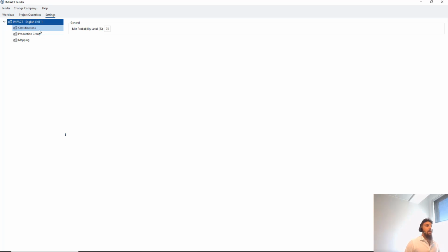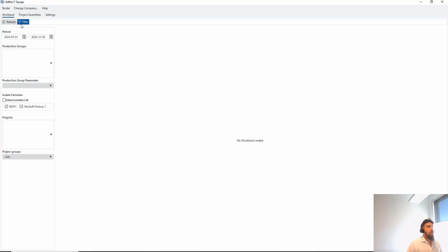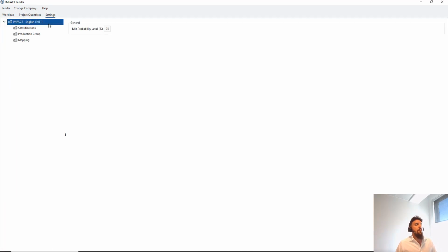First of all, a quick explanation of what we want to do. We want to see a rough workload of the elements that are not in the system. In previous years, when we wanted to rough plan a lot of elements, you needed to have the whole model ahead of time, and that's of course unrealistic. So here you can put in only quantities of elements, no real precast elements, and that will affect your capacity for the future, your tender capacity.